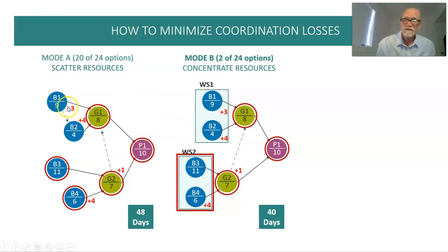But over here, you'll see that the delays cascade before I get to G1. So the 4 plus 3 is 7, and those delays are all added up. Here, the delays somewhat cancel themselves out, and only 4 of those days progress further. So when I have uncertainty in my project, this idea of boxing around the like work in order to get to the key integration points as quickly as possible is still valid, even better.